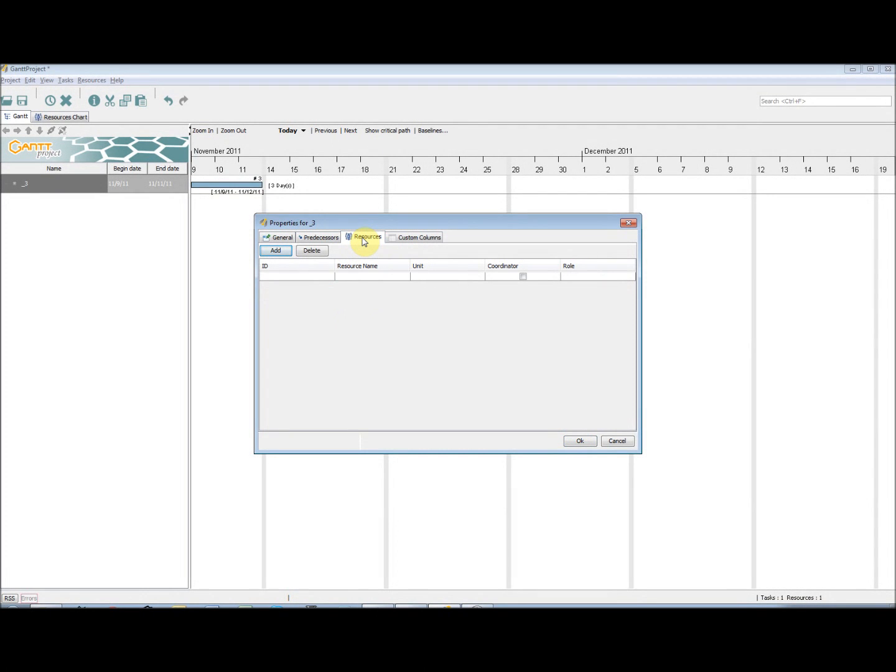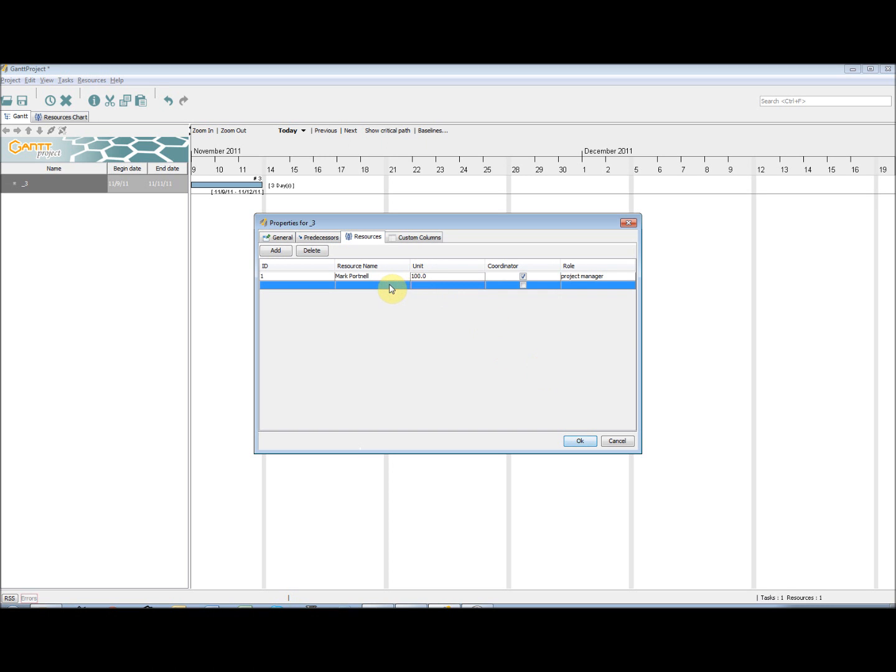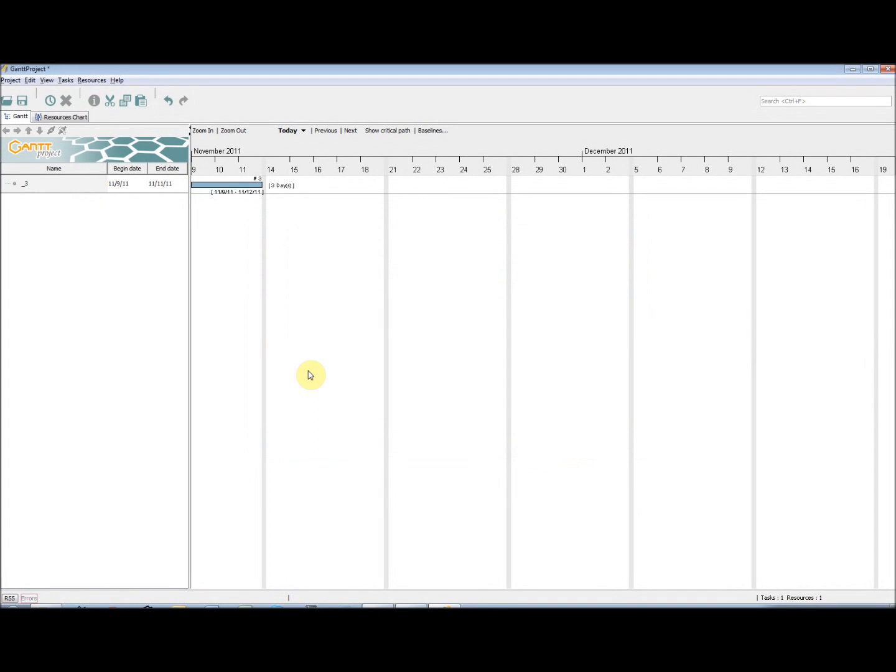If we click on the Resources tab, we are able to assign resources to the task. We can do this by clicking Add, and selecting our resource from the drop-down box. The details for this resource will then come up, and we can then assign this resource as the coordinator for this task, or change the percentage load this resource will take for the task. Meaning that a task can be shared between multiple resources.